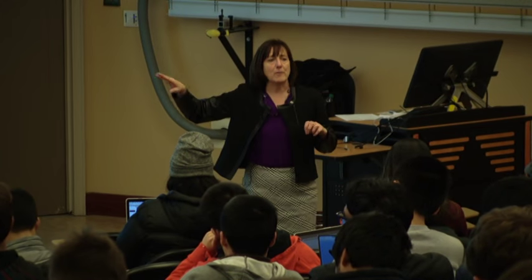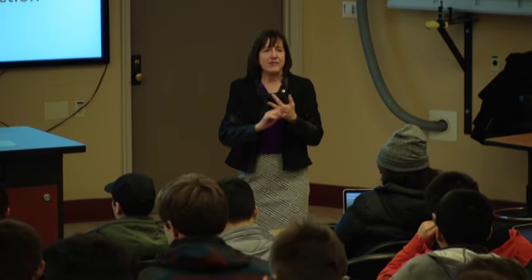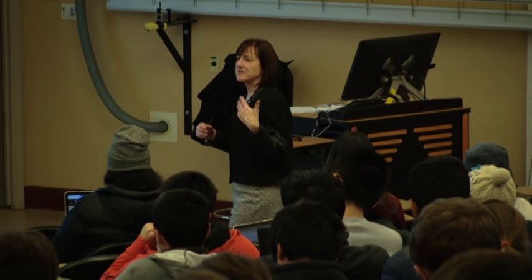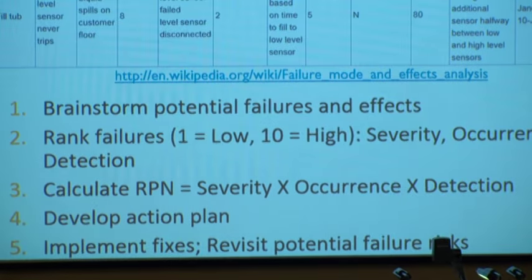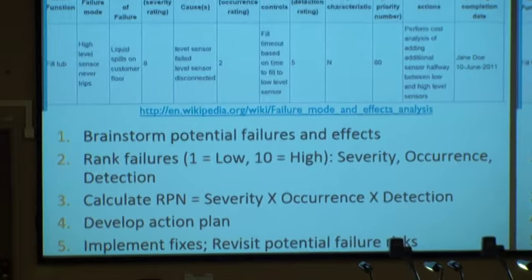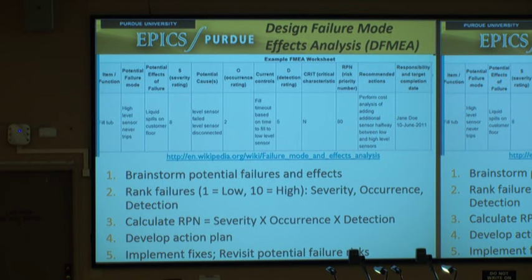You brainstorm all potential failures and rank them based on the severity of what will happen should it occur, how frequently it will occur, and how easy it is to detect. If something is really difficult to detect, it actually poses a lot more risk than things that are easily identifiable. You multiply those factors and get an RPN — a Risk Priority Number — and you can develop an action plan. These are really good things to do once you have some design and want to evaluate potential risks.